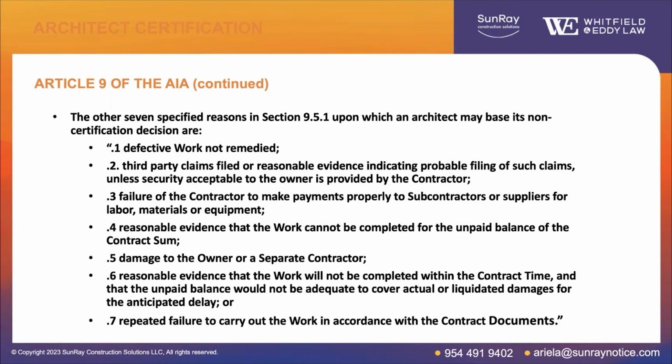The third one is similar, failure to make payments properly to subs. Now, this one often triggers the need to send to the architect or owner the subcontract, or at least a part of it for a subcontractor, if you have a conditional payment clause in it. We're going to get to that topic in more detail later, but the point is, are you making the payments properly? And that depends on whether the subcontract requires the payment.